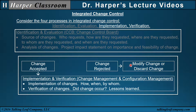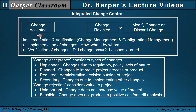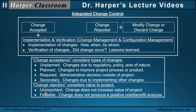If a change is rejected, it can either be modified or totally discarded. When a change is accepted, it may be unplanned acceptance (changes due to regulatory, policy, or acts of nature that are unexpected), planned (changes to improve project process or product), or required changes (administrative decisions outside the project or secondary changes). Secondary changes occur because implementing one change can require a change in another part of the project. If a change is rejected, it is because it is unimportant (does not increase project value) or not feasible (does not produce a positive cost-benefit analysis).